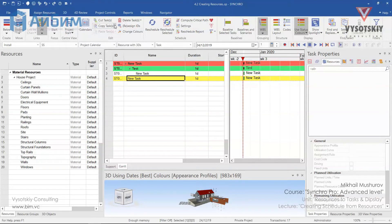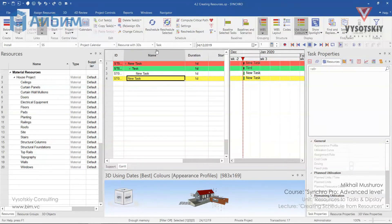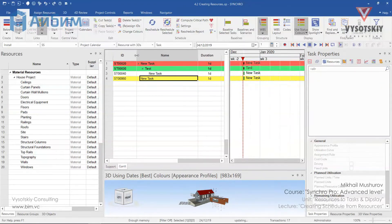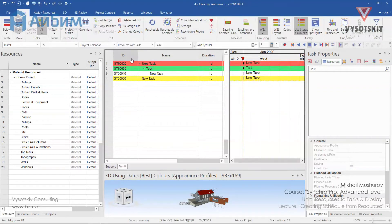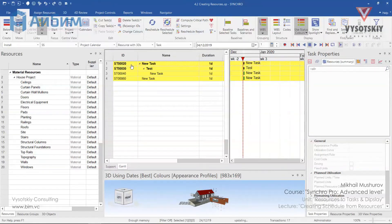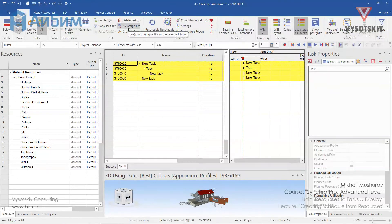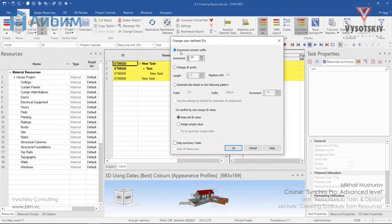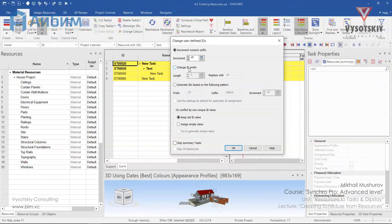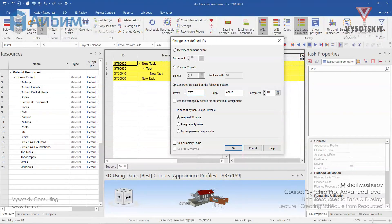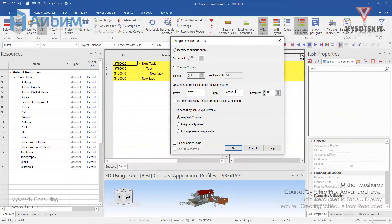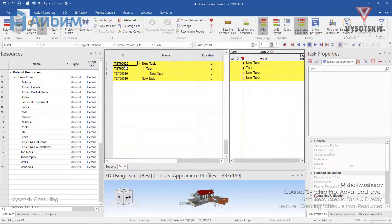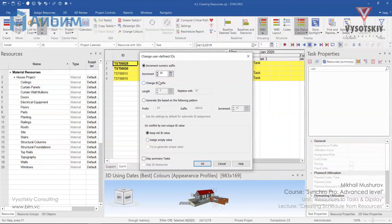When you change task's position or add delete them from the table, it's better to reassign task ID. For that, select all tasks that you've been reorganizing with a shift and click over reassign IDs. In the IP dialog, you can select the way IDs will be reassigned. You can change the increment or prefix or generate a new pattern. You can write test, suffix 10 and increment will be 5 and OK.